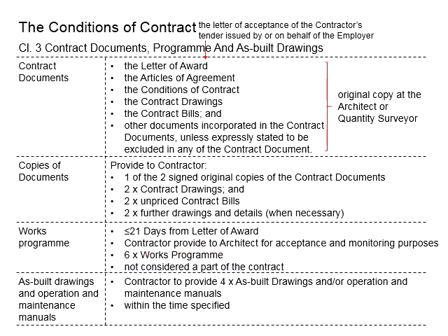The reason is that it comes after the contract, and also this work program shows the intention or the tentative progression of the work by the contractor. It is subject to change due to certain unforeseen circumstances at the time the work program is made.